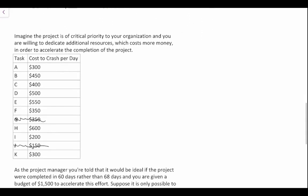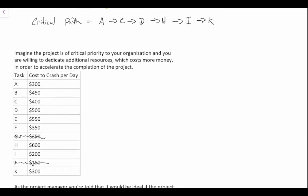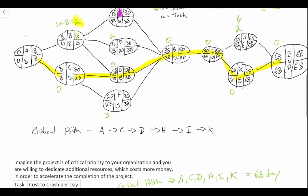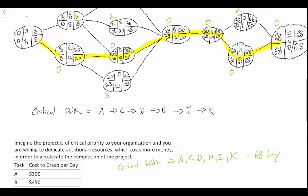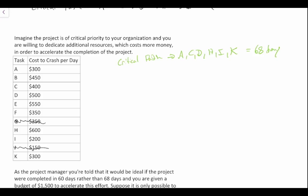We'll scratch out G and J since they're not along the critical path. Our critical path, as determined in the previous question, is A, C, D, H, I, K — and this was 68 days. Looking at the costs on the critical path: A is $300, C is $400, H is $600, I is $200, and K is $300.